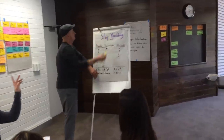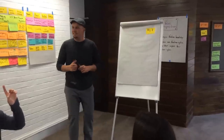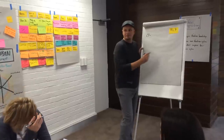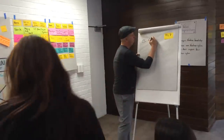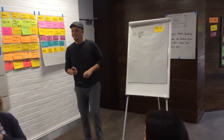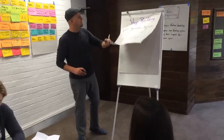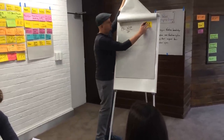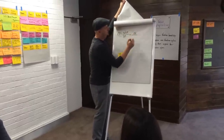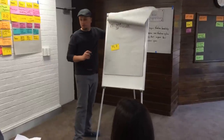Does anybody know what Little's Law is? Or remember? Yeah? So the lead time of a system is equal to the WIP divided by throughput. Exactly. So we have all these numbers, right? So what was the WIP after 2 minutes? We have it here, the first round. It was 22, right? So WIP was 22. Our throughput was? 4.8.